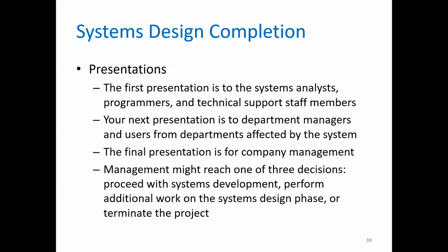Finally, presentation. The first presentation is to the system analysts, programmers, and technical support staff members. Your next presentation is to department managers and users from departments affected by the system. The final presentation is for the company management. Management might reach one of three decisions: either to proceed with the system development, to perform additional work on the system design phase, or finally, the last option is to terminate the project.